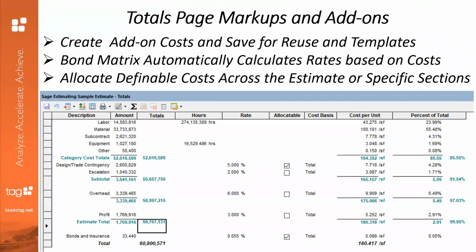And do notice that here are the hours that I mentioned earlier. You have equipment hours and you also have the labor hours. This could also be set up as days, but this is most valuable when it comes to the scheduler doing a projection on what it's going to take to build this project. And at least they could see the hours and the man days. It'll still take a scheduler to set up the actual durations overall, or the crew sizes for that matter.